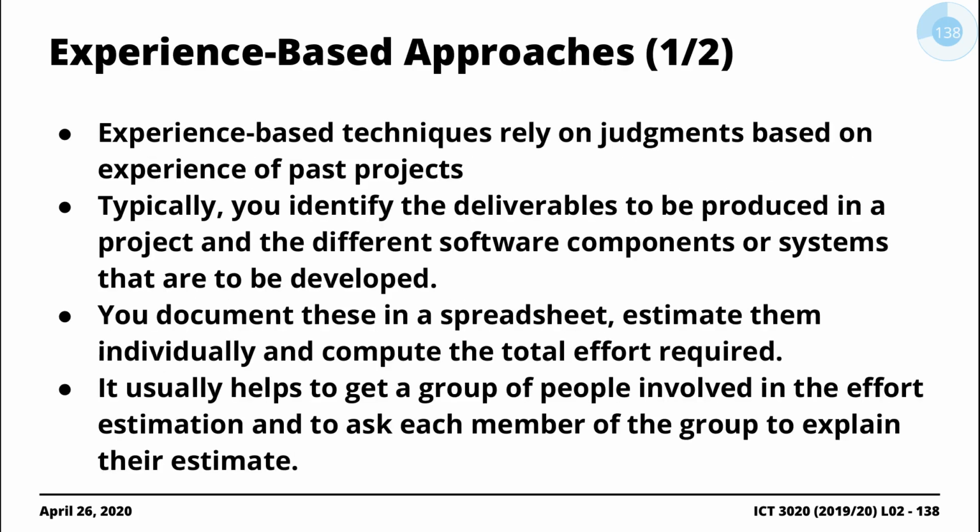All right, so in terms of looking at the pros and cons associated with these 4 different approaches we just spoke about, when it comes to the process of using analogies, you realize that this is heavily dependent on subjective views coming in from the people working on the project. In this case, it would be the people managing the project, right? And obviously, anything that is subjective in nature is generally not going to be very accurate. It will give you a reasonable estimate, but it won't be as accurate as something that is more objective.